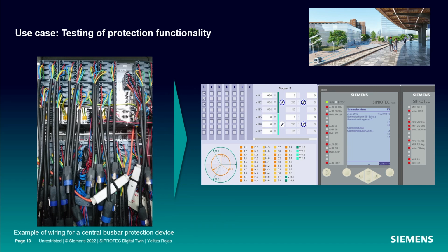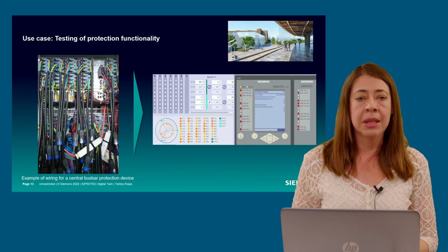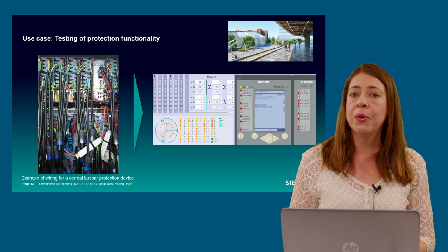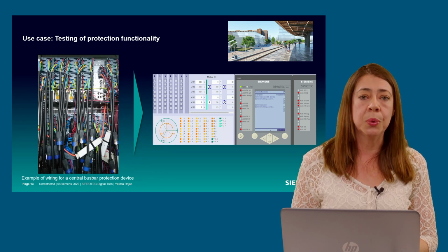All the required current channels are simulated for the injection, as you can see here. The connections are simulated with the virtual wiring, and even the response of the circuit breaker can also be simulated with help of a CFC logic in an extra device. The testing procedure can be reduced from days to just hours, thanks to the virtualization.